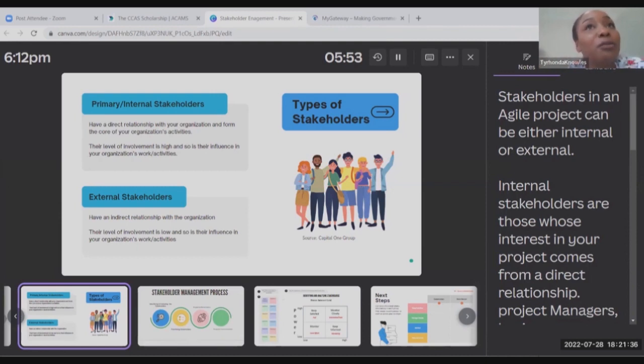Now, to the second part of your question, in reference to whether we tell them if it's Agile or waterfall: in the Bahamas, this is still a fairly new concept. So we will say it, but it doesn't mean anything to them. What we do is make them aware that it will be released in phases, and that is something they understand and accept more easily. It's also important to manage expectations, because what we find, especially in IT related projects, is that sometimes they want everything all at once.